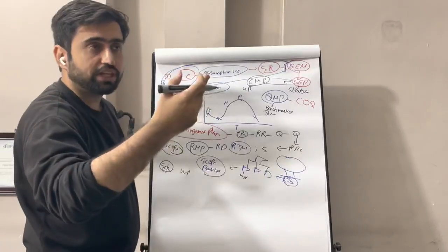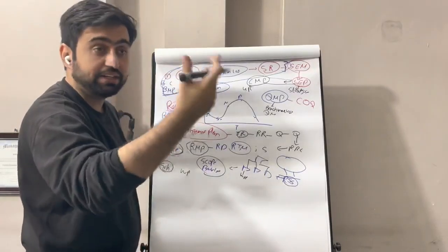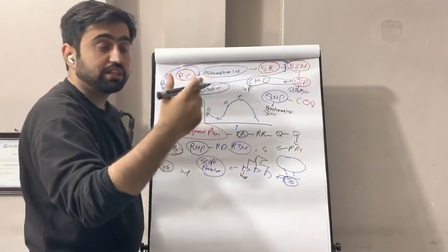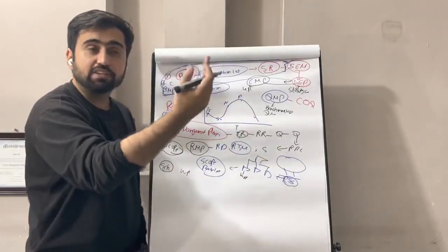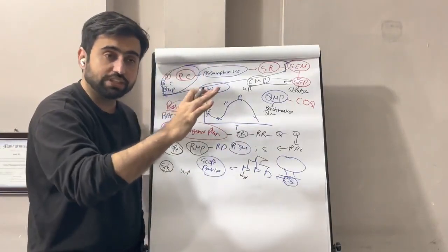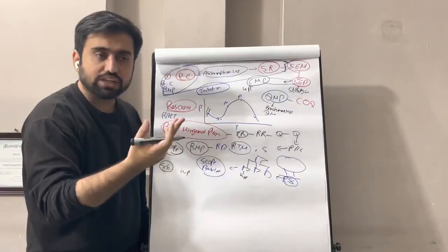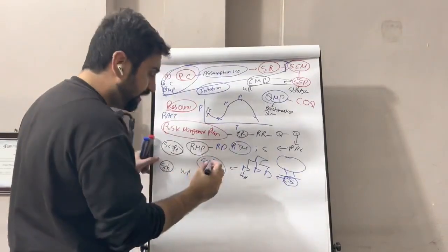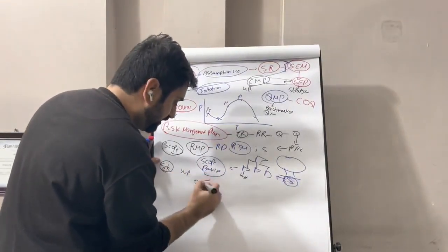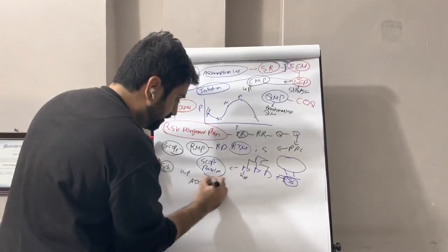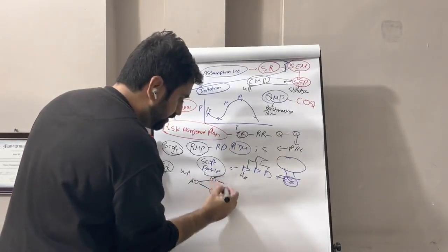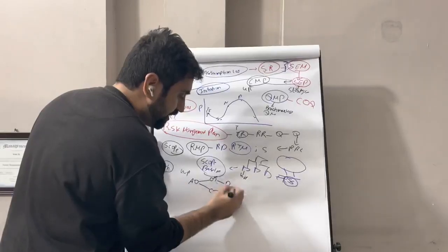We sequence those activities. We put the dependencies: mandatory, discretionary, internal, external. We see what the logic between them is: finish to start, start to start, finish to finish, start to finish. And we make precedence diagramming methods, like activity A, B, C, D. This is basically the precedence diagramming method.